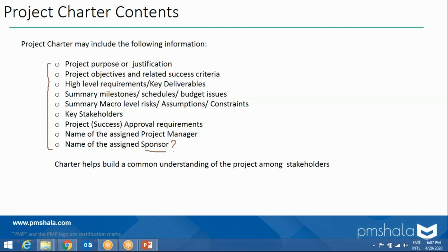More, handle escalations from the project manager. Please note, the sponsor is the single point of escalation for the project manager. If there's any issue that the PM is not able to resolve with the given authority, who does the PM go to? None other than the sponsor. And the sponsor has to resolve them. So in a way, the sponsor backs the project manager. These are the major responsibilities of a sponsor. I hope you got that.